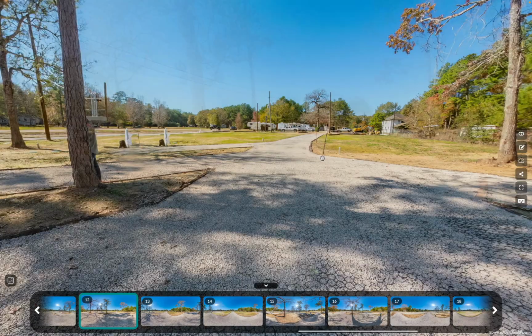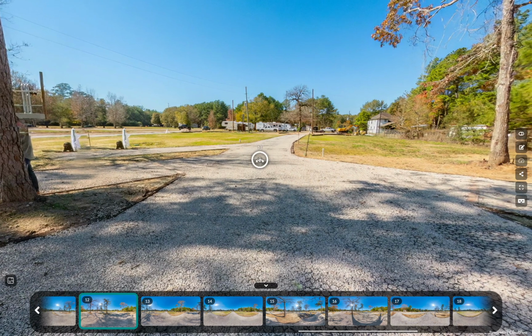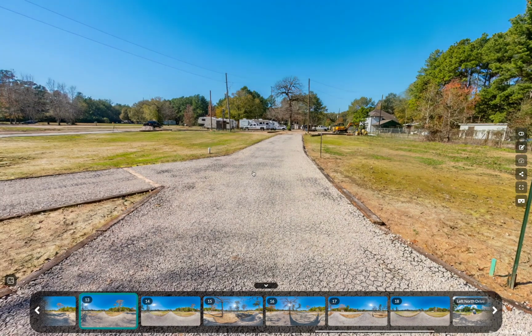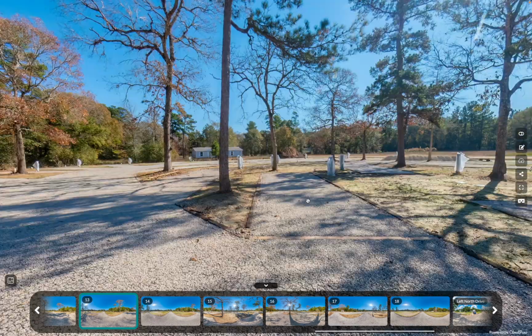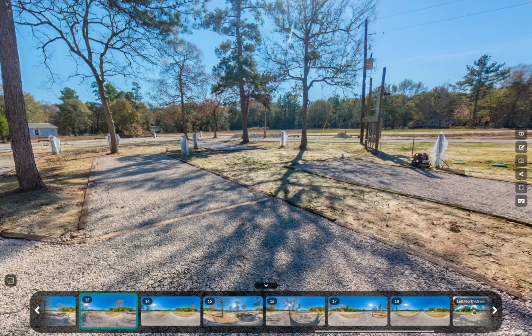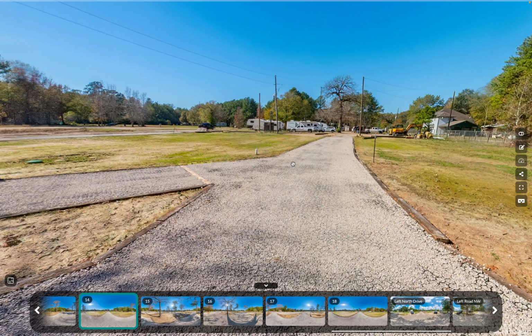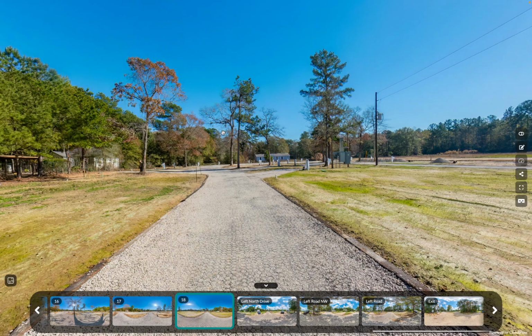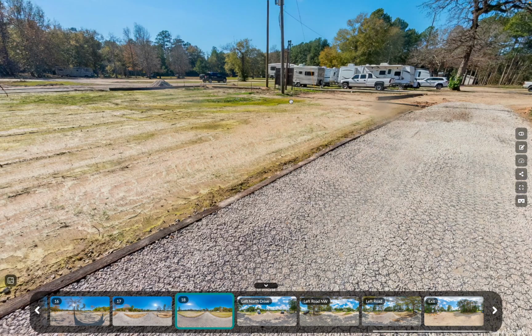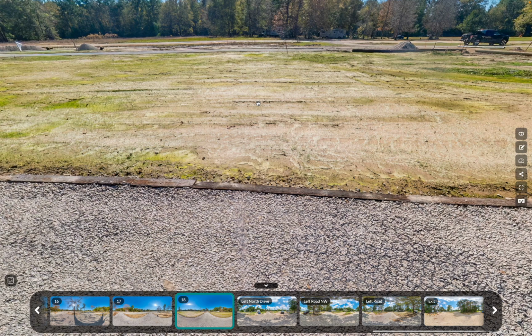And you can see here as well in front of us, here's the septic field. We had to get that permit. It was one of the hardest permitting things, part of the process. But you see that once this back part was installed, we kept as many trees as we could. We actually moved spaces around just to keep trees. Trees are so important, so valuable. So we tried to keep as many as we could. And we did that. Then once we finished, we were able to start to move those folks out from this west side over to the east side.